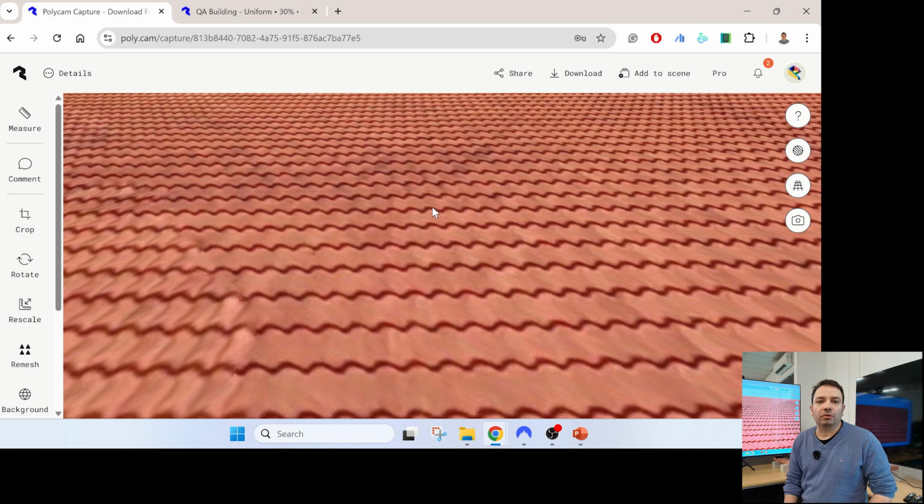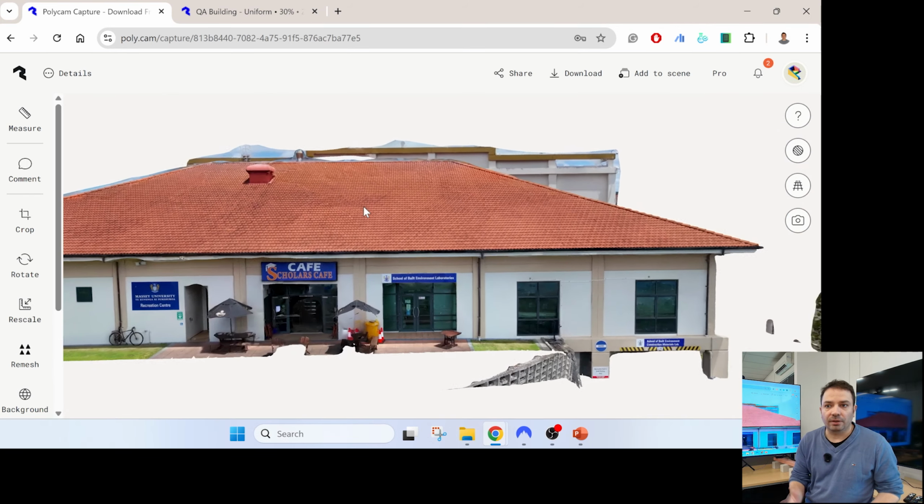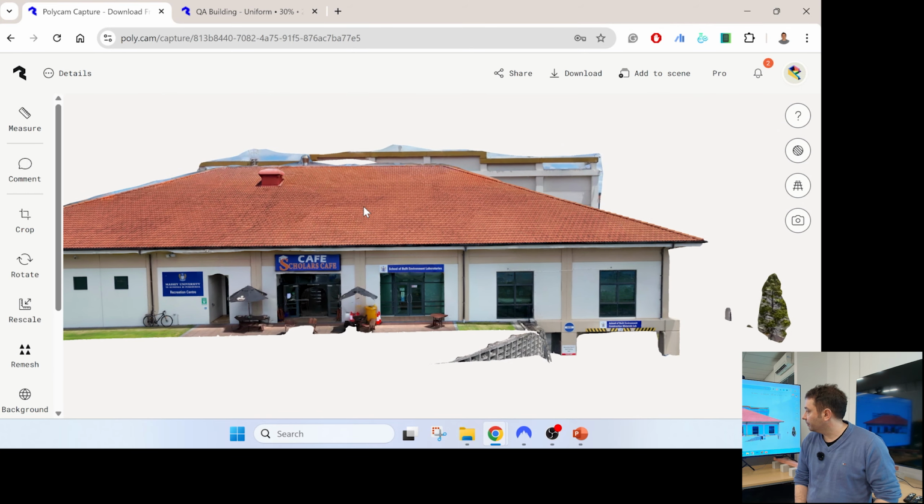Like if you want to monitor if a dam is moving, and they move depending on the load of the water, don't use photogrammetry. If you want to understand how many cubic meters have been excavated, roughly you will get a good measurement using photogrammetry. So there is a solution and there are problems. You need to try to match which one is the cheaper and what will be the error that you will get depending on the solution. Not bad, eh? It's pretty good resolution.